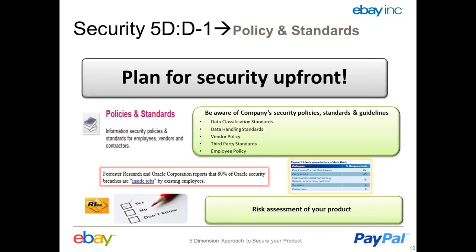Apart from that, when we develop a product, always do a risk assessment of your product, saying where it stands in terms of risk, whether it is a high-risk or a low-risk product in terms of security. If a breach happens, what will be the huge loss, where does the loss take place, and keeping that assessment in place, you can plan other activities in terms of design, testing, third-party vendor testing and so on.